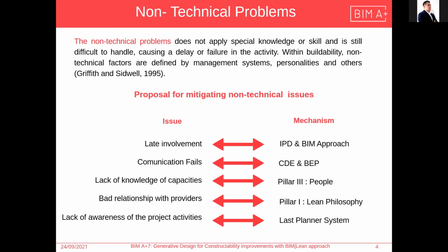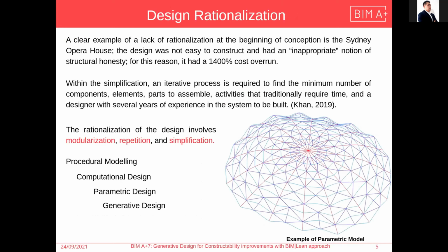For that, with the Last Planner System, using the master plan, the look ahead, and the weekly advance, we can give information to the workers so they can better understand the status of the project. Then we focus on the technical problem of design rationalization. And this is because it's one of the most important issues that we have.